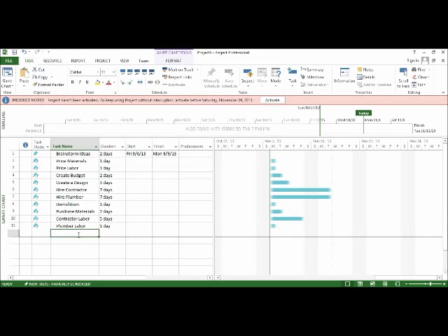After the contractor came out and the plumber came out, then it was time for us to go back to doing it yourself, and we were able to take care of the painting of the bathroom. We wanted to do the painting before other major work. Just that way we could go back and touch it up, but we wouldn't get paint on the tile or mirrors or things like that. We had a bare wall and a bare working space, so we were able to go ahead and paint and get that done, and that took 1 day to paint.